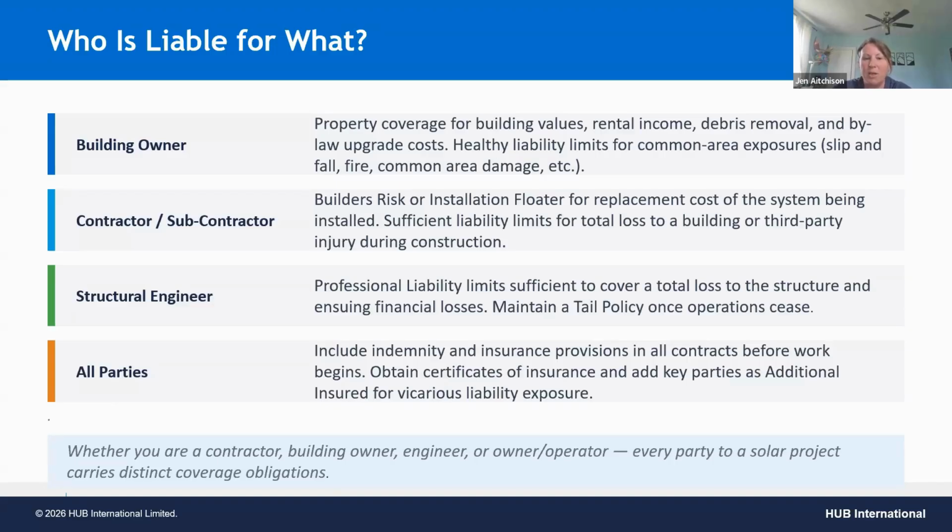And of course, making sure that the certificates of insurance are kept on hand, and additional insured status is noted. If you simply get evidence of insurance and you're not noted as additional insured where you need to be, you can't simply go through the insurer to get indemnified by their policy. It can create significant challenges both during work and after work should something arise post construction.